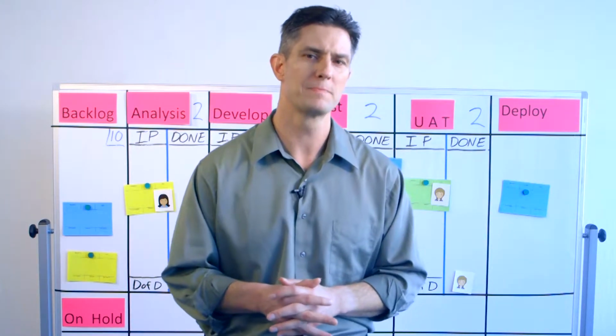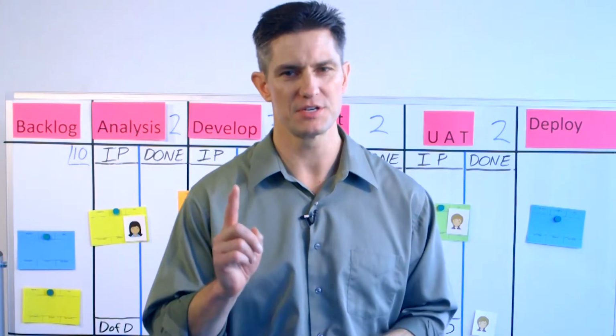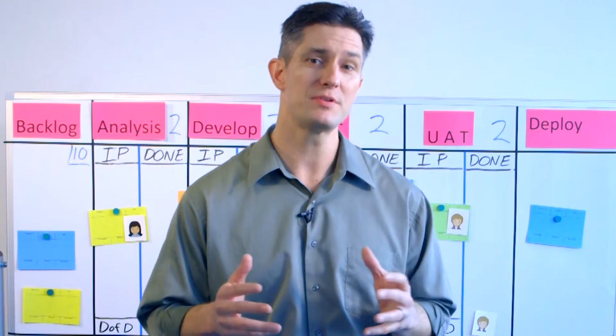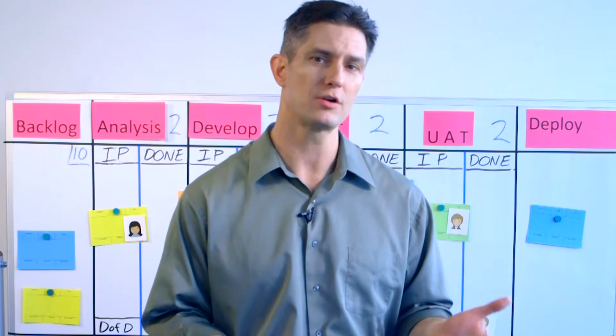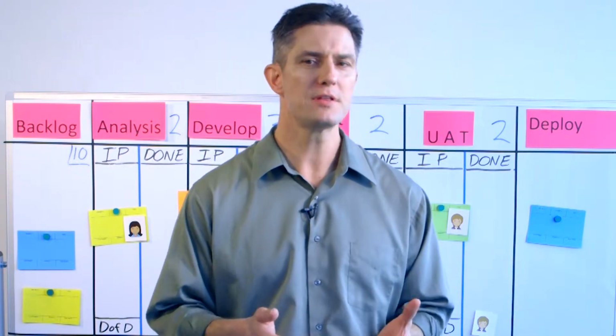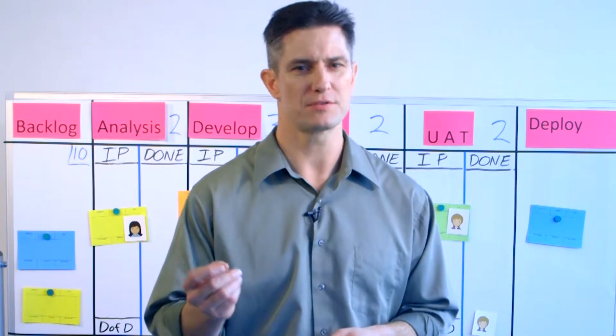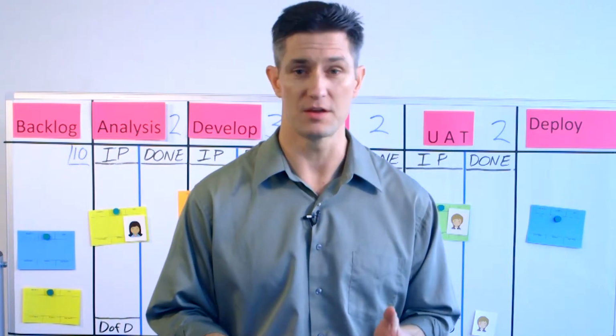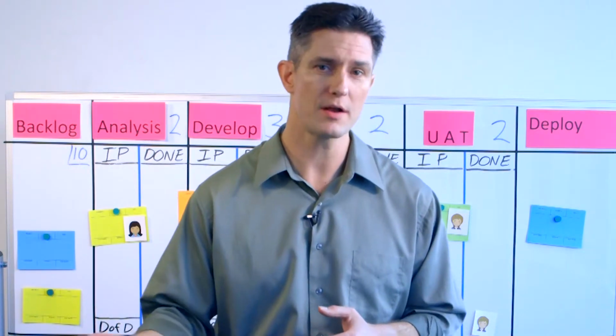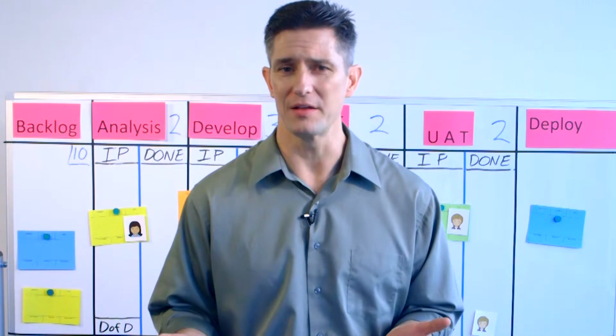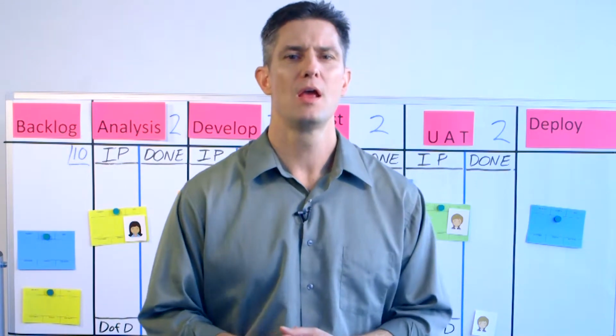Another meeting that can happen daily, but more often is once or twice a week, is a bug triage meeting. A core Agile belief is that over time, more brains make better decisions than just one. So the bug triage meeting is open to all team members for both input and learning. All new bugs entered into the ticketing system should pass this meeting for decision. We ask if a bug should be fixed or not, and if fixed, when: in the current release, an upcoming, or later on in the future. Is the bug even valid? If not, let's just close it out.